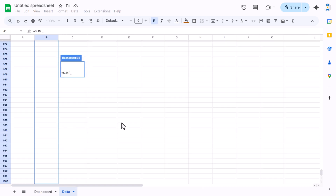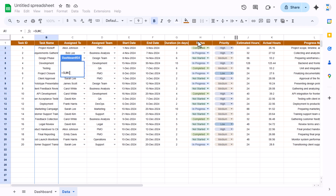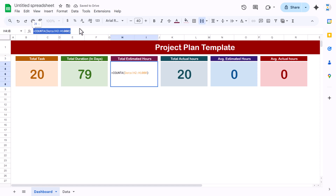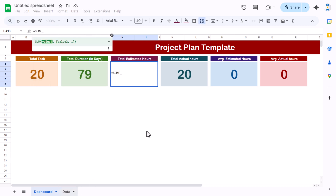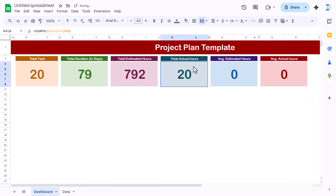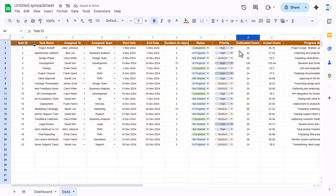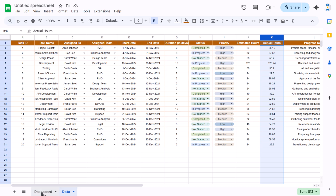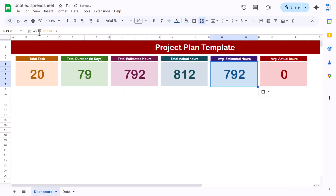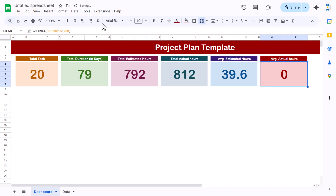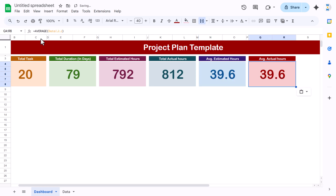Now we will put the formulas. Total Duration will be SUM of the duration column G in the data sheet. Total Estimated Hours will be SUM of column J. Total Actual Hours will be SUM of column K. For Average Estimated Hours, use AVERAGE of column J. For Average Actual Hours, copy the formula and replace SUM with AVERAGE for column K.